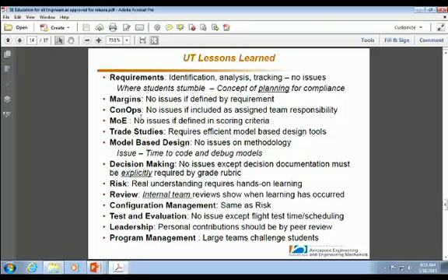So anyway, here are our lessons learned. Requirements: piece of cake. Teaching students about requirements, how to track them, how to manage them, how to demonstrate compliance is a piece of cake. They have almost 300 requirements they have to keep track of across the two semesters, and they do it in a spreadsheet. It's relatively straightforward. Requirements have to be assigned not by organization, but by name. Who is the person responsible for that requirement? What are they going to do to demonstrate compliance? And where's the proof they did? It's that spreadsheet, and it's graded, and it's responsible for a portion of their semester grade. So they learn requirements really well.